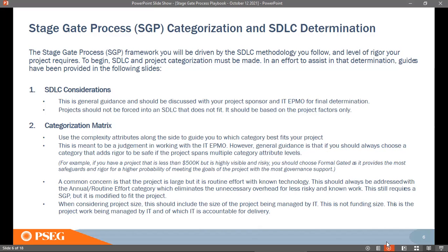Like I said, the framework is there for you. If you are adopting it in total, well and good. If you are not adopting it, and you feel that some of the tasks are not required, prepare a justification for it. It is not a formal big document that you have to prepare. You basically have to explain why you, or the project team, feel that this task is not applicable for executing the project. And that needs to be presented at the gate. So think of every gate as a check point where you have to provide all these details to pass through the gate.